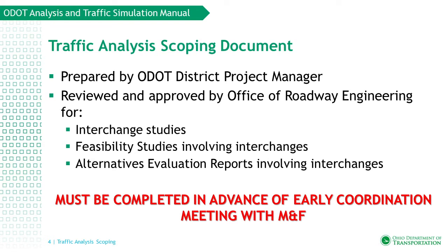Most importantly, the traffic analysis scoping document must be completed in advance of the early coordination meeting with modeling and forecasting, as it could affect their work on the project.